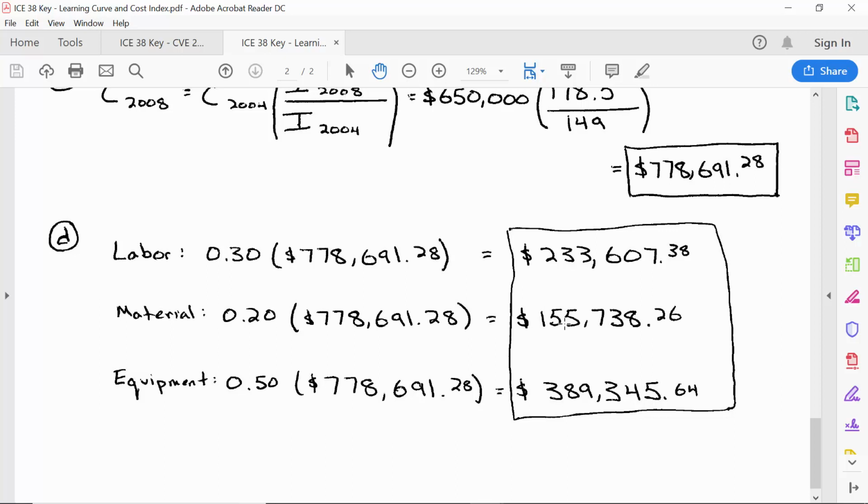And so you could get cost data like this that's specific to Alaska. And remember how we were talking about it wouldn't be wise to project cost information for constructing a building in California to that of constructing a building in Alaska? Well, you could make that comparison if you had cost-specific data in California and for Alaska, and then constructed a ratio similar to this.